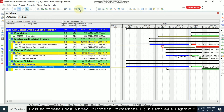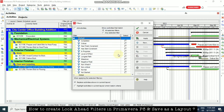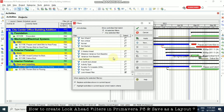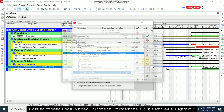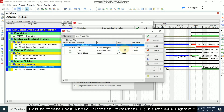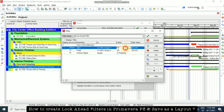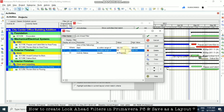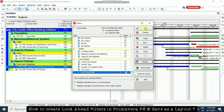Again I'm going to the filter, clicking it and then Modify. Now I'm going to put DD minus 1W, which means one week before the data date will also be shown. Click OK and then OK.